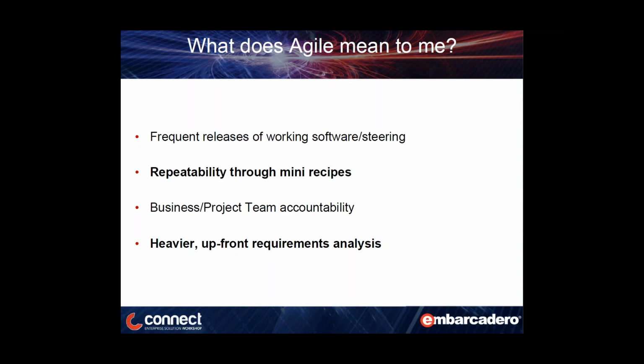By doing this up front, we get a good idea of the scope of the project. It gives us a good handle on saying, well, you want this done in 6 months? It's not going to happen. It's probably more of a 12-month kind of project. It gives us an idea of what data sources we need to incorporate in reporting and things like that as well. By doing a little bit heavier upfront analysis, the idea is getting the bigger picture, not really detailed requirements. It'll give you an idea of the size of the project and the amount of effort required as well.